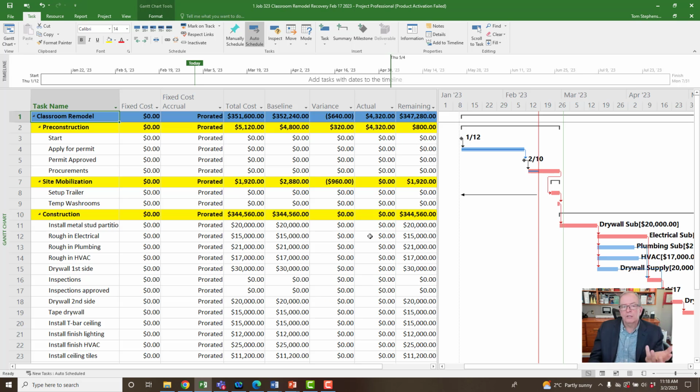The nice thing when you cost load a schedule, you're thinking about variable costs. And I think one of the things that you should always understand is there is a cost per diem every day that you run your project. You might have a trade partner that takes longer on your project, and you don't have to pay them extra because they're a fixed price, but if you have to stay longer and manage that project longer, then there's your costs.